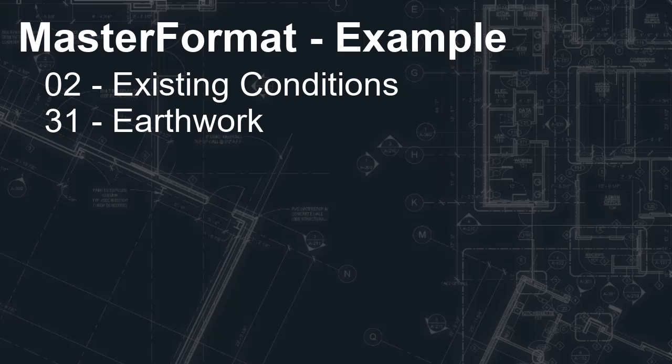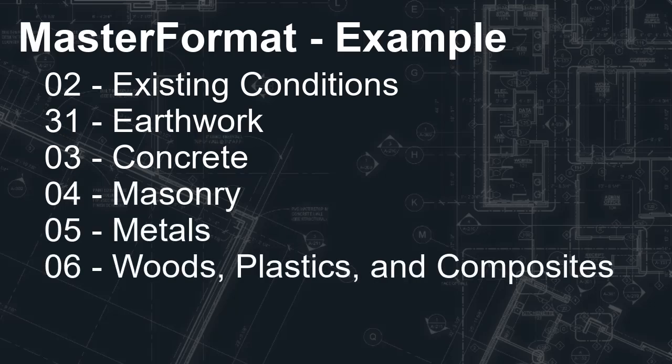Then you're going to be doing footings and foundations and so on. So now you're at 03, concrete. And then you're going to be building up walls. So you get into things like masonry and woodwork and so on. But if you look at the master format and the details, you're going to see that it does follow a construction order, and that's real helpful.